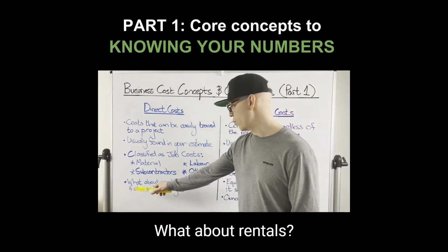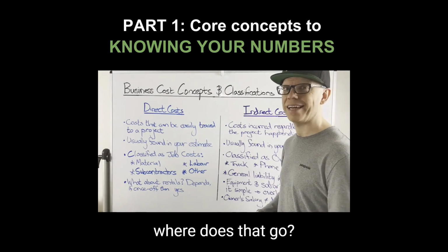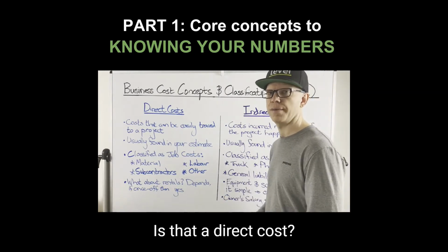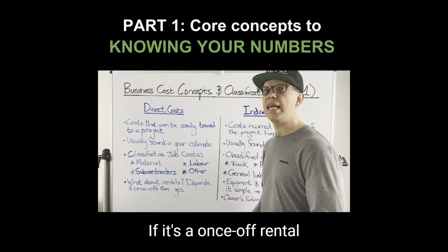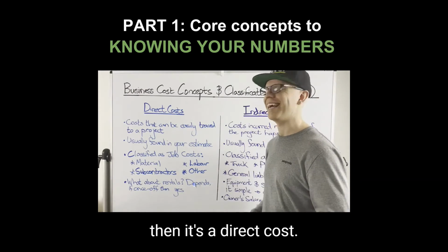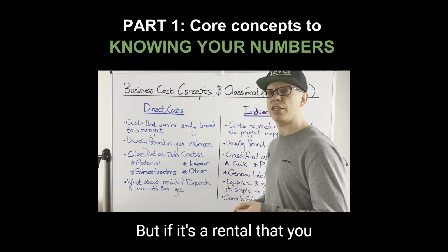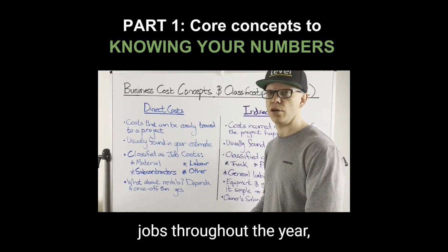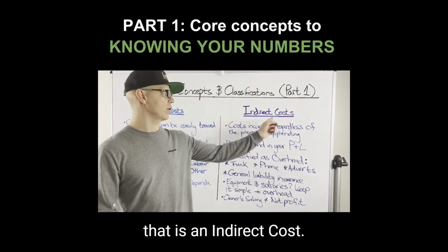What about rentals? When you rent equipment, where does that go? Is that a direct cost? The answer to that question is it depends. If it's a once-off rental specific to that job, then it's a direct cost. But if it's a rental that you plan to use on multiple jobs throughout the year, that is an indirect cost.